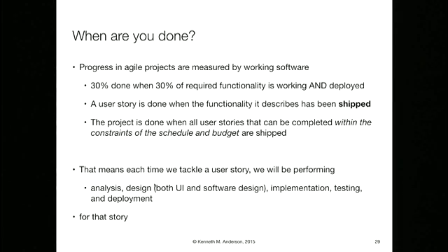all to say user story 1 is done. Whereas in a traditional development, we might say, well, we're not going to worry about the UI for 6 months. We're just down here at the database. And just one level above, we'll do some unit tests. Yes, I can insert things. Oh, I can delete things. And that's what we're going to do for the first 6 weeks. With Agile, you can't. You have to do a whole vertical slice, because you got to show something to the user. You know, the feature you asked for can be done.